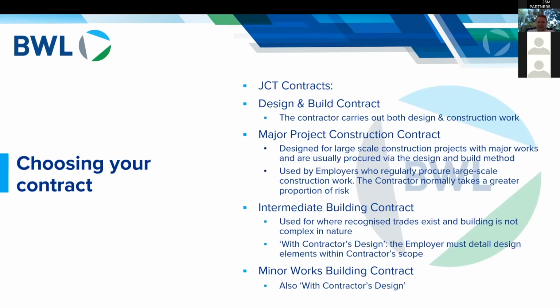So it really is quite a nuts and bolts approach to construction contracting, and the title gives it away as well. So it's design. So it's contemplating that the main contractor you're engaging with is responsible for design elements as well as the build elements, and because of that, you end up with more clauses, more pages, more words, and more complexity.